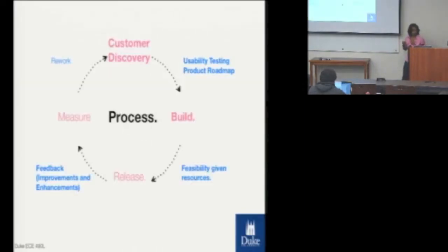Okay, so coming back now to what we talked about, the reason that we want to factor in all of the bugs or all of the feedback that we get after we've shipped is because there may come a time where we decide in our product roadmap it doesn't make sense to introduce any new features, right? Because we've got enough people who are either upset with the current product that if we just build more stuff, it's just going to keep piling on, and we might actually need to do an iteration, or we might need to have a month where all we're doing is fixing what we've built.